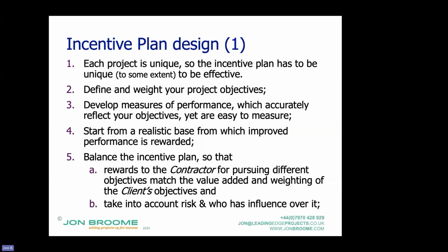But the other incentive, a relatively little amount is put on it. Let's say £20,000, and it's stakeholder management, and the contractor goes, well, actually, I can achieve that easily. Stakeholder management is keeping people informed and happy. I actually don't need to put any extra people on that. It's going to cost me nothing to do that, but I'm going to make sure that they do it, because £20,000 is an extra 2% profit, and I only normally make 2 or 3% profit on my jobs. So actually, that's really worth it.